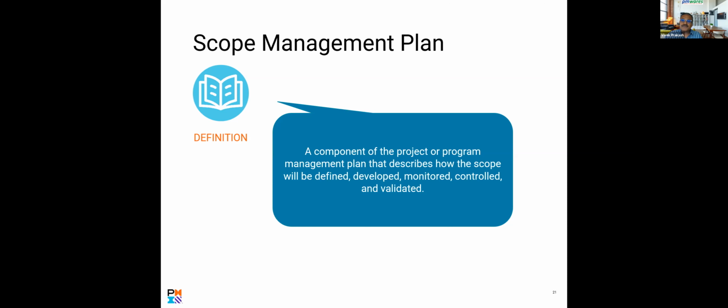Like I say, I have to prepare a schedule. What will I do? I will open Microsoft Project and start developing the schedule. But have I decided whether my unit of measurement will be days, hours, months or weeks? No, I haven't decided. So what am I going to put? I probably randomly put something, and it may or may not meet the project requirement. I took weeks, and a week is not precise enough to define the project schedule. Then I have to make changes later, and it will generate rework.